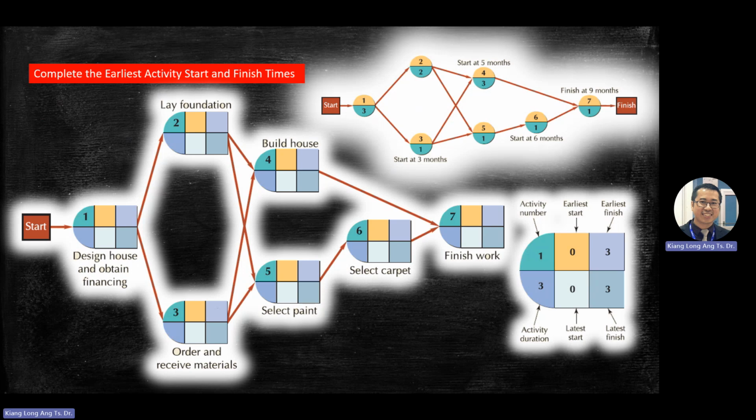When 2 options go there, you see 4 and 5, right? Which one you choose? Be very, very conservative. So we use the maximum number. 4 and 5, you need to choose one. So here is 5. Number 4, you refer to here is 3. Here is 8. Here also same. This one goes 2 arrows. But this one, if you refer to this one, you choose 5. So this one, you refer to here 1, it will be 6.